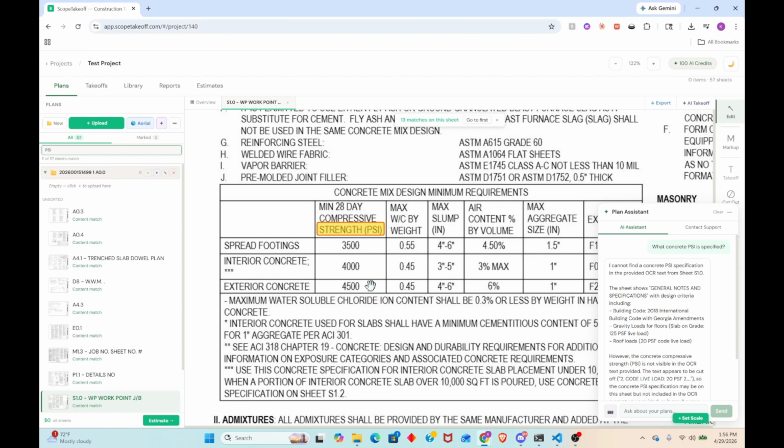After you have a plan open, you're going to go to this takeoff tab. Obviously, you're going to do a new takeoff here. It's going to prompt me to set the scale. So I need to go down and find a scale. You can also do a calibrate or an auto detect from the drawing. I usually find it's easiest just to set the scale there.